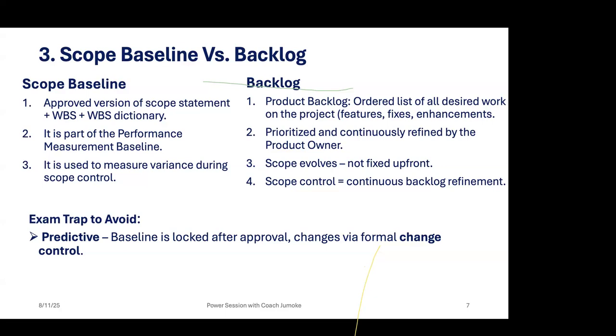For you to change it, it has to go through change control. And change control is managed or headed by the change control board. They are the ones that will say, okay, we don't mind. We will give you the extra $20,000 to accommodate this change, and we'll give you an additional 3 weeks to accommodate the change. So it's the change control board that can do that.